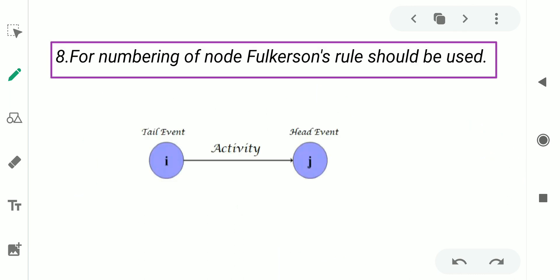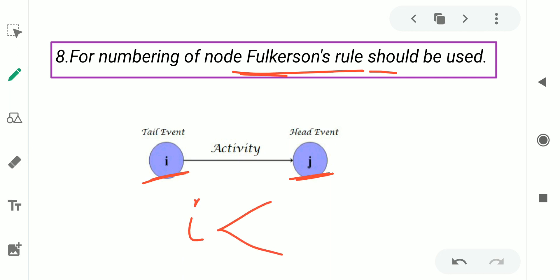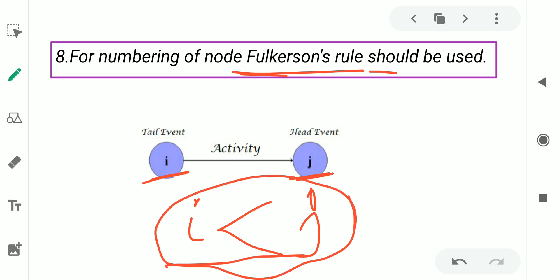The eighth rule is that for numbering of nodes, the Fulkerson rule should be used. The Fulkerson rule is a large topic and will be discussed in another video, but the basic statement is: if an activity has a tail event numbered i and a head event numbered j, then i must be less than j. This is the basic statement of the Fulkerson rule.